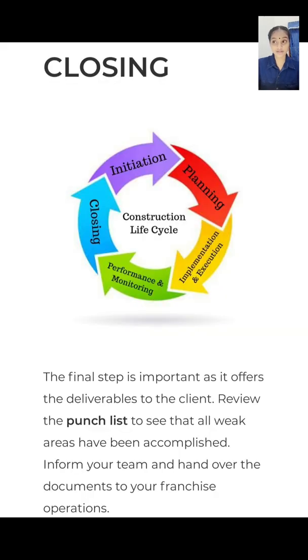Closure is the final step. This is important as it offers the deliverables to the client. Review the punch list to see that all weak areas have been accomplished. Inform your team and hand over the documents to your franchise operations. Before terminating supplies contracts, review termination provisions and give written notice.